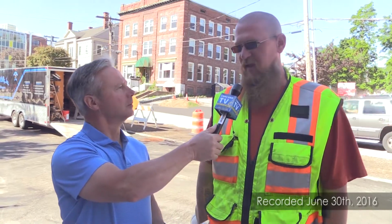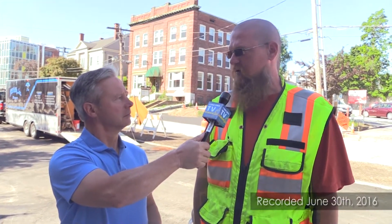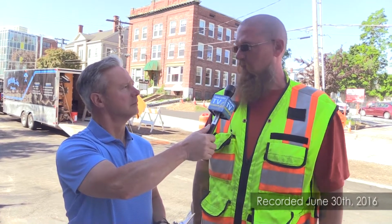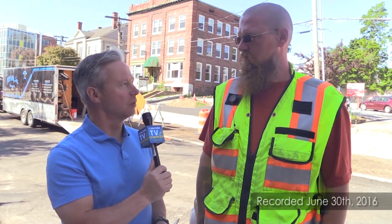Yep. Conduit's just like any other pipe. We've got a variety from 2-inch, 3-inch, 4-inch, all the way up to 6-inch for each respective utility: electric, cable TV, telecom, and fire alarm. We'll be placing all that conduit next week, pouring concrete to encase it and protect it for the future. Okay, and my understanding is that we have 7 utility companies that will be involved in eventually connecting all their lines underground here into the buildings and businesses, yep.